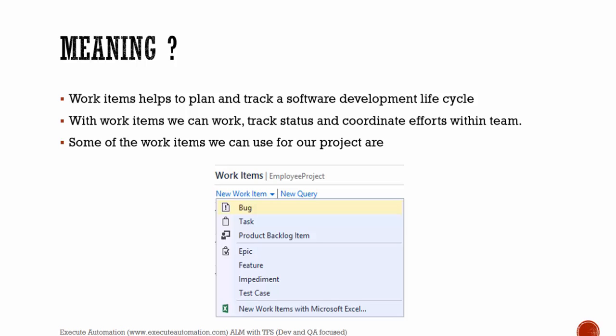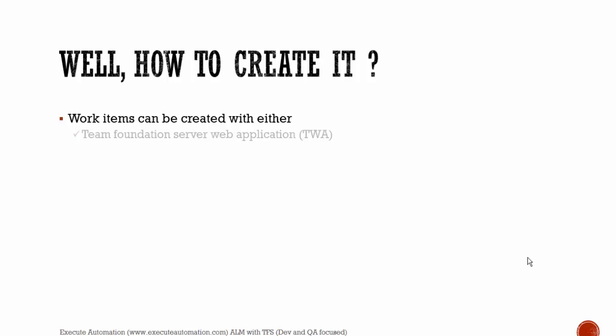The first three — requirements, tasks, and bugs — are the core items. Based on a requirement you can create a task, and if there are any issues you create a bug. Other items like epics, features, impediments, and test cases are also important and related to these. All these work items can be created using either the Team Foundation Server web application (TFW) or using Team Explorer in Visual Studio.